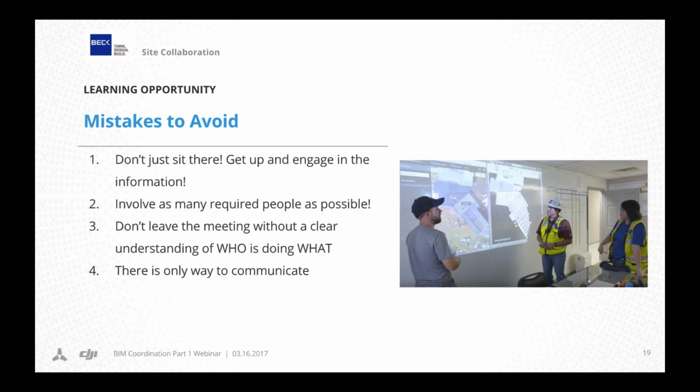And so taking that through the finish line and saying, hey, you need to go and do what we talked about in this meeting, you now should have a full picture, HD, full color of what is happening out on site and the direction we need to go. So that's really important. And we found that we weren't necessarily doing that. That was something we learned really early in our projects: these are great meetings, but we need to leave with specific points to move on with.